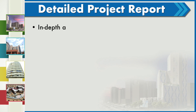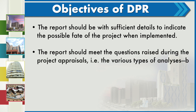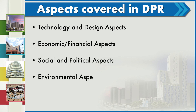The Detailed Project Report (DPR) is an in-depth analysis of a project prepared after the feasibility report. It includes reports from specialists and different consultants covering fields like market research, engineering, finance, and other stakeholders. The DPR should have sufficient detail to indicate the possible fate of the project when implemented, address questions raised during project appraisal, and cover financial, economic, technical, social, and environmental aspects.